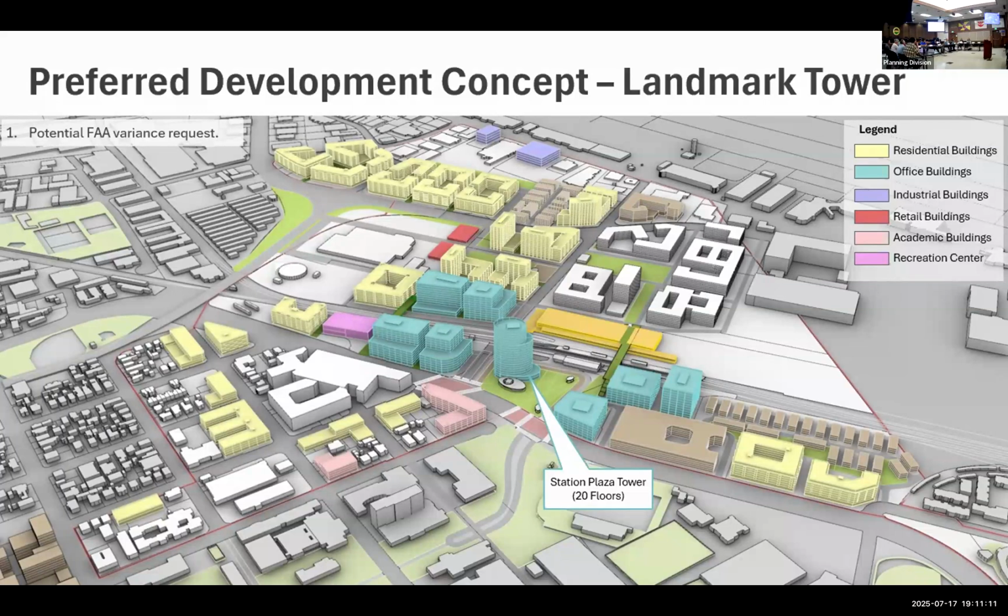So the private developer would have to file the variance with the FAA with all the specifications. And then I believe there's special conditions they can put on the project to how the roof is designed and, you know, the lights and such. So they put more restrictions in some sense and more, I guess, red tape for the developer, whoever's building it, probably increasing cost. Oh, yes, definitely.